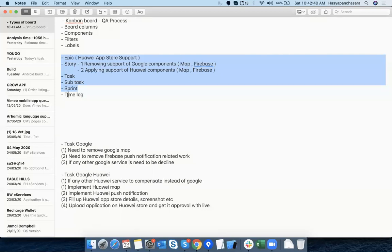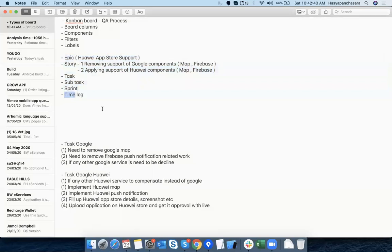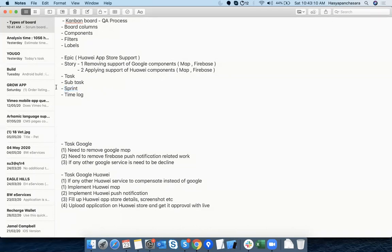For time log — whatever task and subtask is there, you can give an estimation like 8 hours, 4 hours, 16 hours, etc. Whenever they complete a task, put it in Done, and close the sprint — at that moment they need to provide the actual time spent. We'll now do a practical for this. Any theoretical query or shall we start practical?